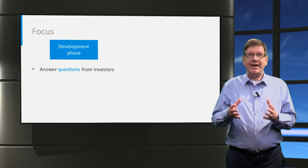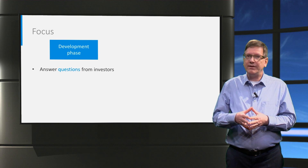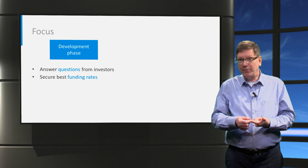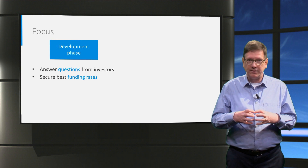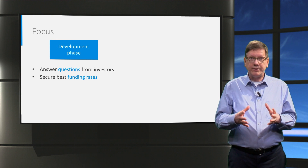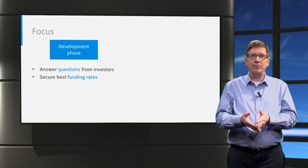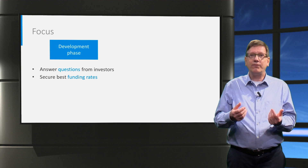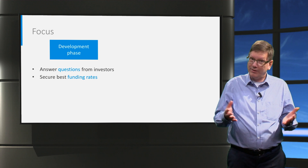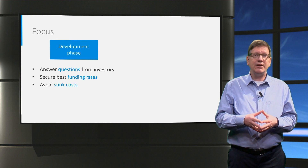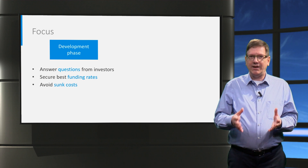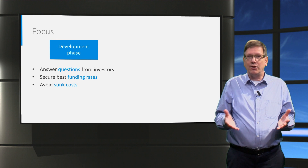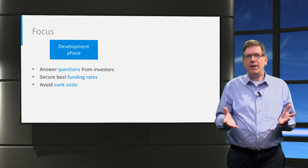Furthermore, their lack of knowledge also makes the investor or lender more sceptical towards your project. That was reason number one. Reason number two: at the time of closing, the project funding rates are locked in, often for many years. All the work you've done to reduce risk at that point will help to reduce the funding rates. With a 20-year financing, that homework will pay off over 20 years — it's a good investment. The third reason to start early: if you do not succeed in the project financing, all the project development costs will be lost forever. We call that sunk costs, and in a large and complex project, the development costs can be millions of dollars — all the more reason to focus carefully on risk management early on and to identify potential deal killers as soon as possible.